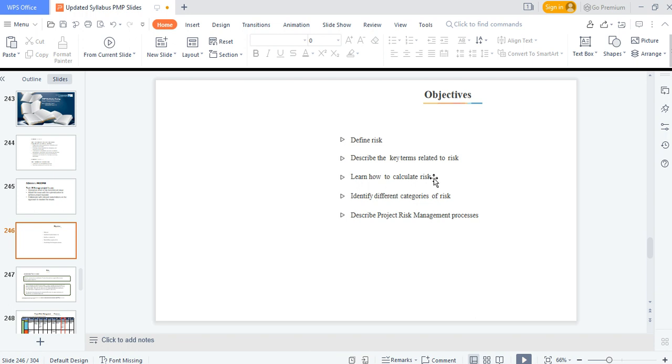Quantitative risk assessment, qualitative risk assessment. For instance, if you say we're going to be impacted, how are we going to be impacted? What are we going to lose? Are we going to lose $10 billion? That is kind of quantitative. If you say qualitative, what's the risk? What is going to be the impact? We're going to lose customer loyalty. That is a qualitative. You're trying to